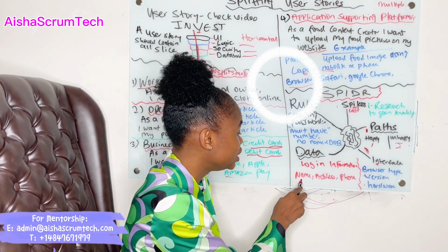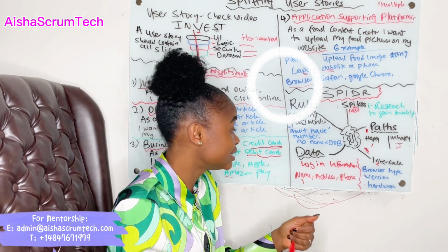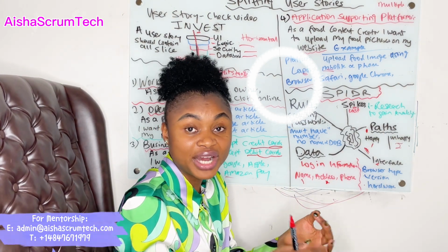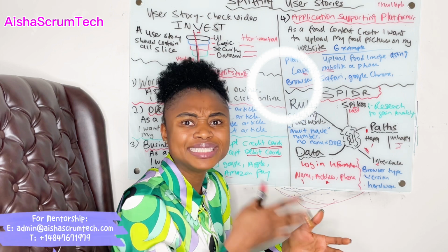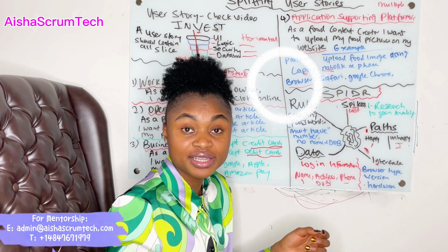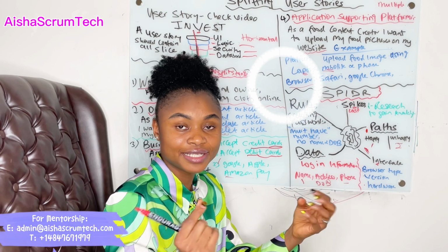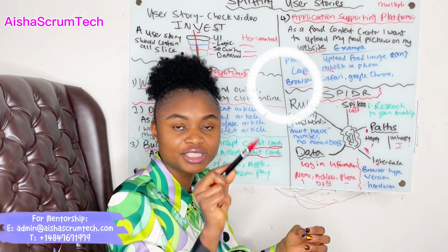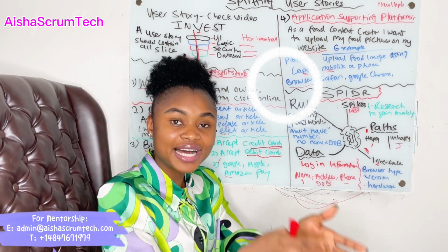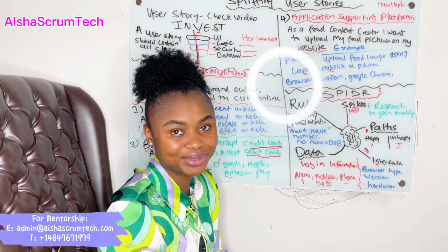So we can say for this sprint, we're going to focus on anything text. We can focus on having that data in this sprint, anything text. And the next thing we can put is numbers, like if you have your address or zip code, all those things can be put in following that for the number. Date of birth. And with date of birth, we can also have a calendar, right? And the calendar will show for you to pick what date you were born and all of that. So maybe we can split all of those based on text, calendar, and address by numbers, instead of us just doing all of that in one sprint.